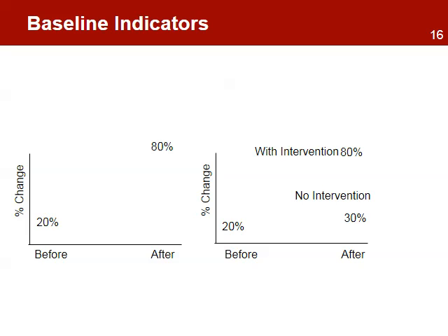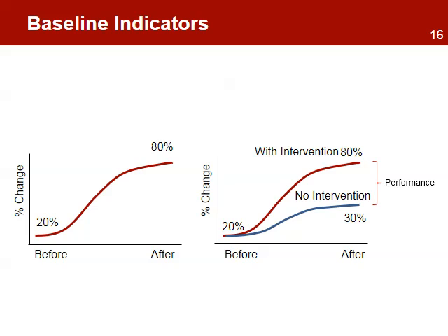There are 2 options for making comparisons. One option is comparing the situation before the intervention with the situation after the intervention. The second option is to compare changes with and without an intervention. The with and without approach compares changes in the intervention area with similar locations or control groups outside the intervention area. Such comparisons capture the incremental changes that occur as a result of the intervention.